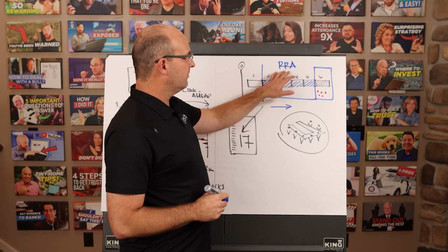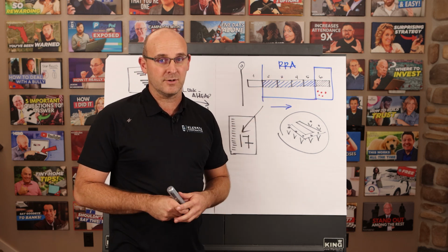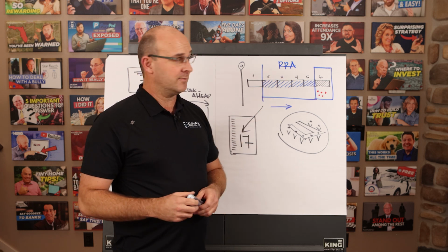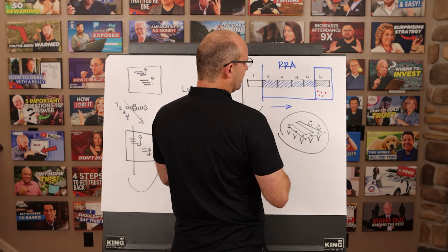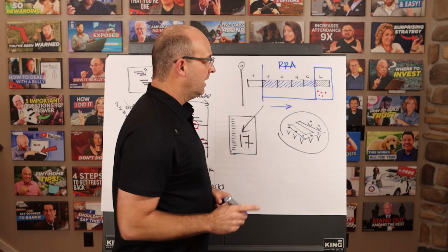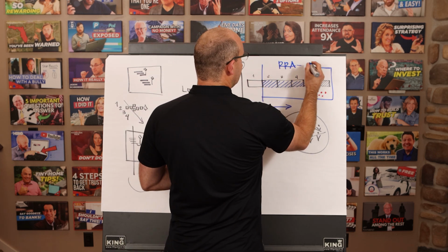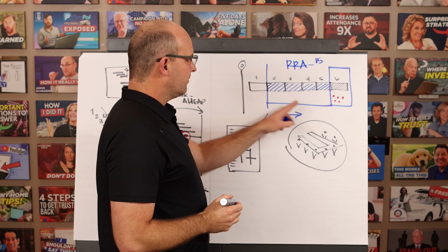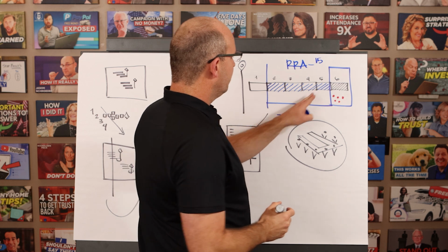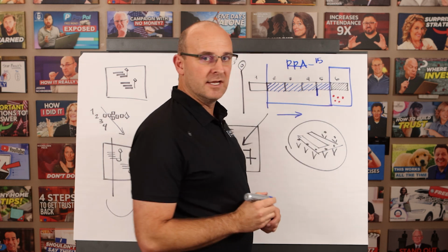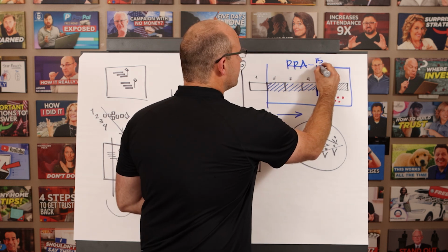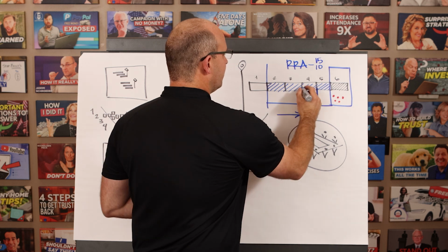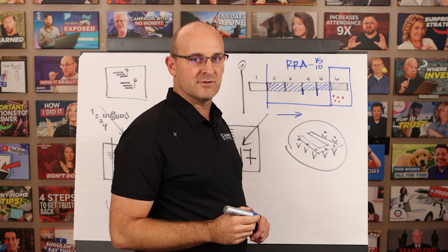But the roadblock removal average, which should be a positive number, preferably 5, 10, 15, means that you saw the roadblock and removed it ahead of time. If you had a number of 15, that means you're getting rid of most of your roadblocks 15 days before they impact you. If you had a number of 10, you're getting rid of your roadblocks on average 10 days before impact.